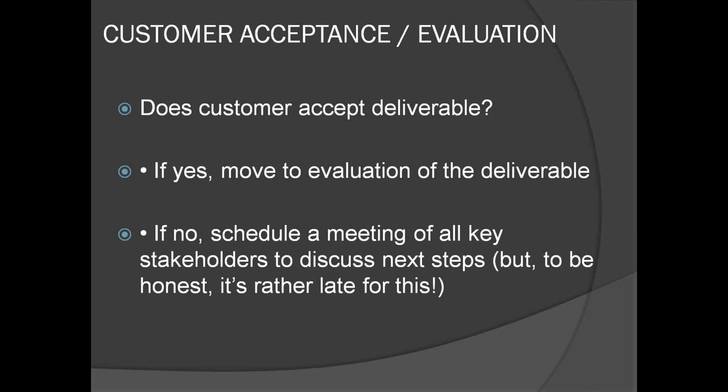So what I've done for you here, and if you get my application, if you get this presentation, you're more than welcome to take this, but really here's a checklist of what you want to look at. You want to do an internal audit. Was the scope fulfilled? What they asked you to do, was that done? Was it completed on time? Was it completed under budget, below budget, or not? And then obviously you want to look at the sponsors. So the person who supported you in this, the person who gave you all this information, is that final deliverable acceptable? And are they good with closing out the project?